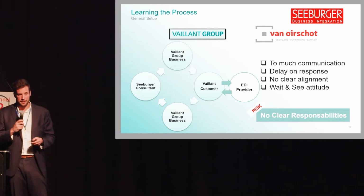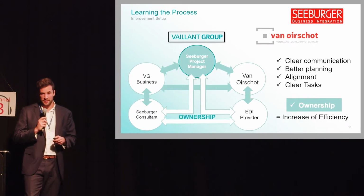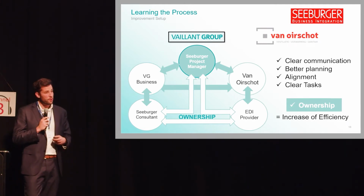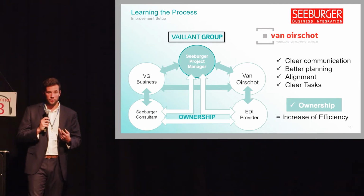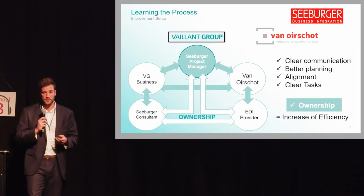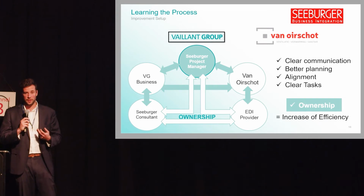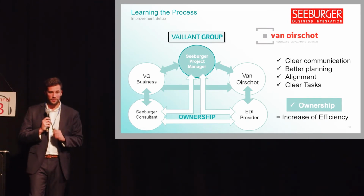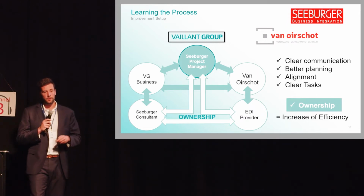So we went back to SEEBURGER and said, yeah, it's not flying the way we want. Can you help us out? And SEEBURGER said, yeah, we can provide you, let's call it a project manager who manages the process and talks to all of the parties. Not only with their own consultants, but also to Vaillant Group Business, also to the EDI provider of Van Oorschot, directly to Van Oorschot. And when someone is in charge and telling you this you have to do, this question is meant to be for that person, it smoothens the process.